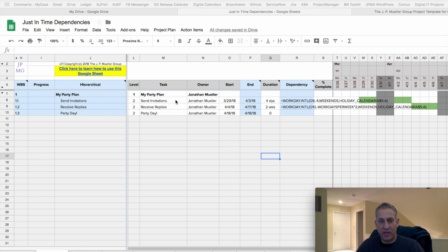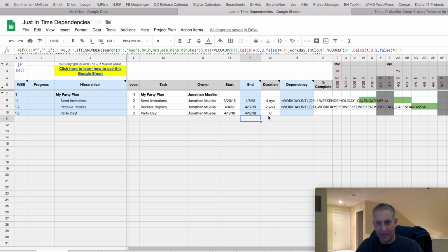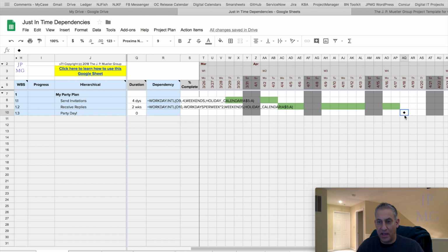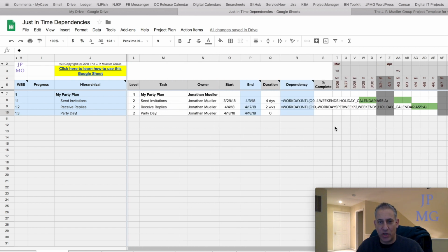Here we're going to have a very simple party plan. There's 3 steps. We're going to send invitations, we're going to receive replies, and then we're going to have the party day. And we start by entering the party day. In this case, we enter 4/18/18, or April 18th, 2018. And we put a 0 in there, so it will indicate a milestone. And you can see the milestone symbol here in the Gantt chart.